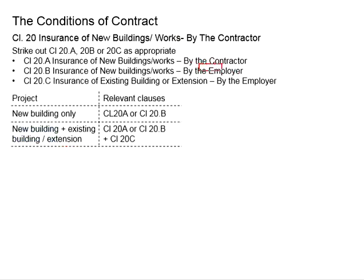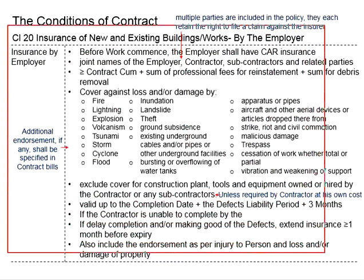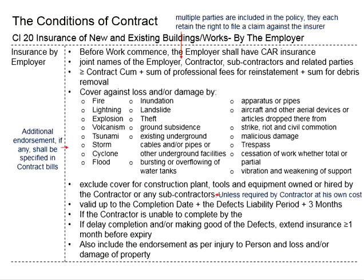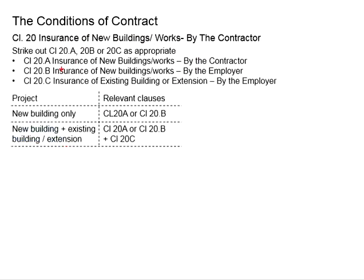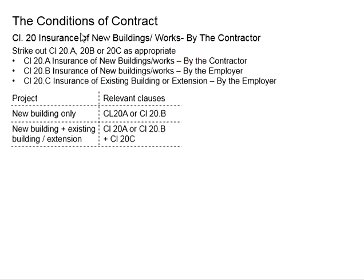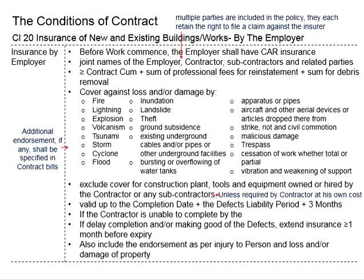If the employer chooses to have the insurance on their side, Clause 20A will be struck out and Clause 20B becomes relevant. Since the details are largely the same, Clause 20B and 20C are discussed together. Clause 20C relates to insurance for existing buildings within the site that may be affected. The same principle applies — it is now the employer who must insure, before the commencement of work.